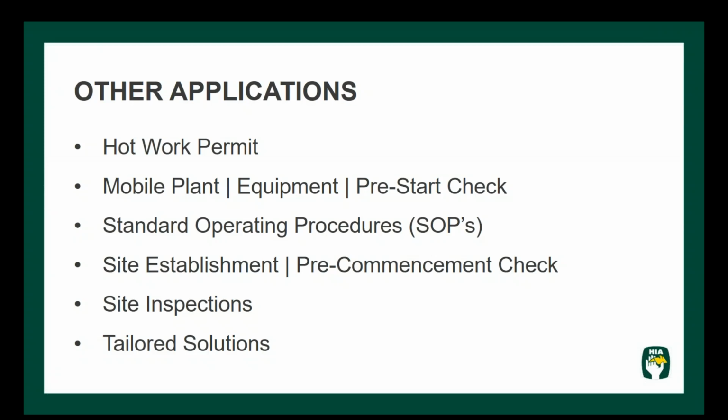In terms of site establishment and a pre-commencement checklist, this facilitates an assessment of the site prior to the actual commencement on site, so it actually forms part of the process, covering hazards such as asbestos fencing, asbestos roofing. There might be contaminated landfill on the site. There might be OTIS form. Now, all of these forms can be customised to suit your particular requirements. And again, the response from that information can then be put to one side, filed away with that particular job as evidence that a risk assessment of that site prior to commencement has been undertaken.